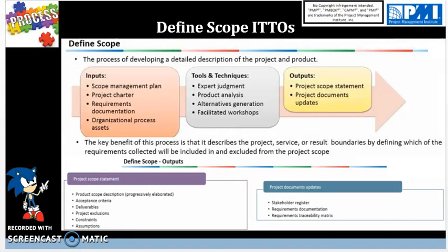Then you have facilitated workshops, which can come in three flavors: JAD, QFD, and voice of the customer. JAD, joint application development, is a facilitated group technique where SMEs, developers, testers, and a project manager develop, test, and document a small piece of a feature or system.